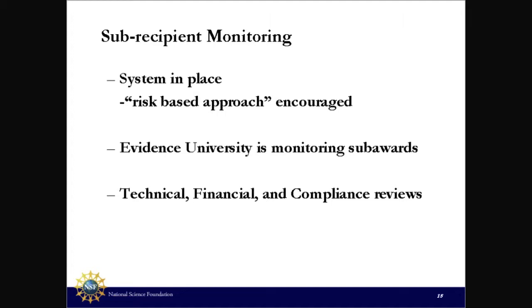And that's the whole part: it's risk. When you're doing this subaward agreement, did you do a risk-based analysis? Did you check to see if they were okay? Did they have an audit? Were there any audit findings? If so, were they reconciled? These are the things that, as new PIs getting into this, you need to think about, because this will not be your last award. This is just one of many to come. So this is something you need to start thinking about when you're in this community.